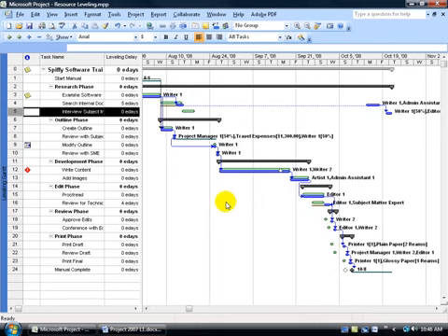Now having said that, if you don't like the way it's leveled, but you'll still be using it, you can hit the undo button several times. But if you click save and you no longer can undo it, then the only other thing you can do is to clear the leveling. Now keep in mind two things. If you clear leveling, it only clears the most recent leveling. So if this is the most recent, then you're in luck. If not, then you're out of luck, and you have to revert back to your copies, if you made copies of your original before you leveled it.